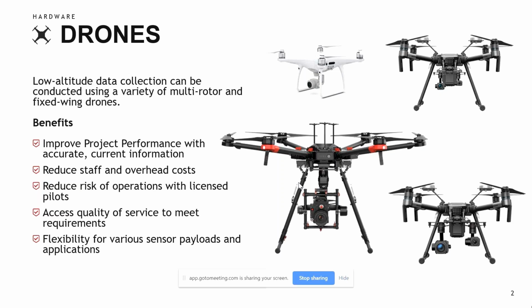And our process is pretty simple. We do actually have a portal on our website where you can go enter in all of your project information. Essentially, we just need to get that address. And from there, we would get that vetted with the FAA. So before we can actually go on site, we do have to confirm that there are no flight restrictions and that we can actually go on site with the drones.